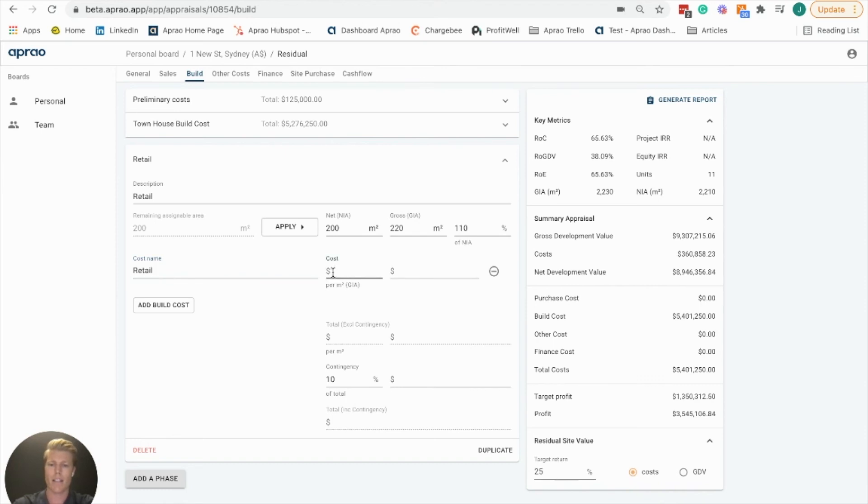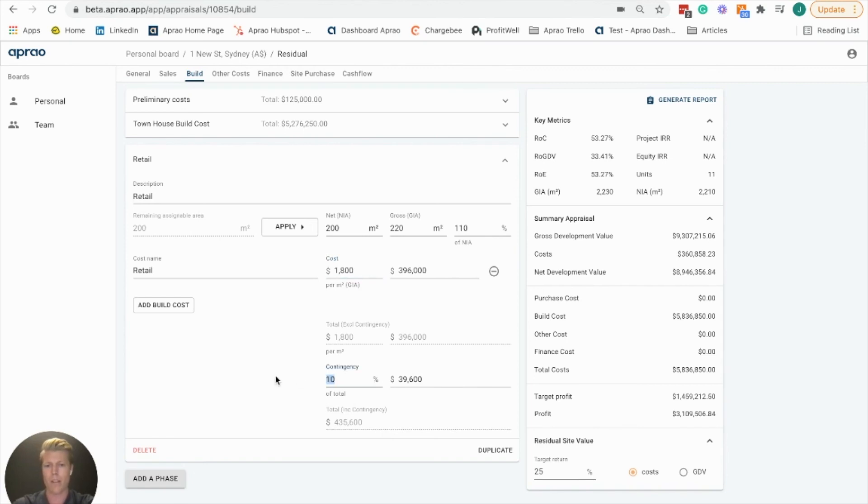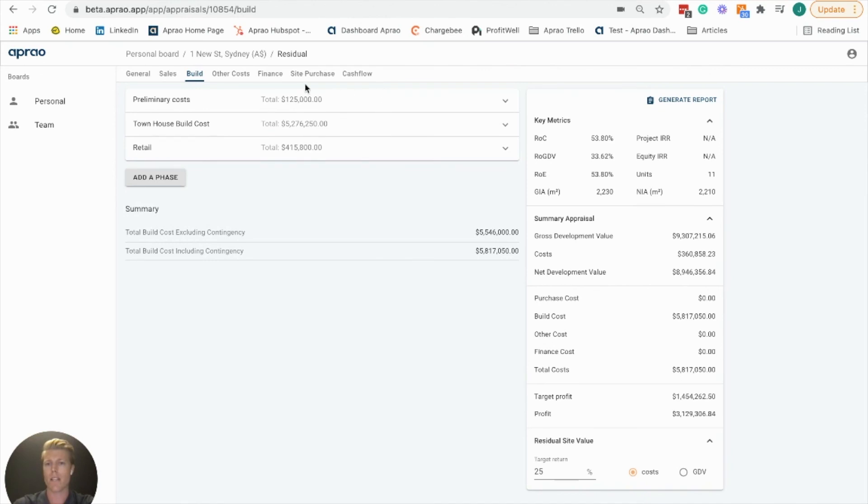This should be a lot cheaper, so maybe $1,800 per square meter with a small development, 5% contingency again. Here we can see all of our build cost.